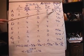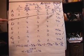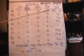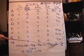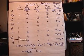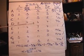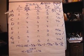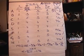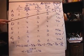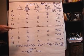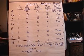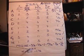So for example this one we take three, that three, minus one, divided by six squared. So it's two over six squared, or four over thirty-six. And we calculate the variance for every activity. Now, we'd like to calculate the project variance and the project standard deviation. Now recall that the critical path was A, C, E, G, and H. So we'll only take the variance from those six activities and add them up to get the project variance down here. There's a hundred twelve over thirty-six, or three point one one.